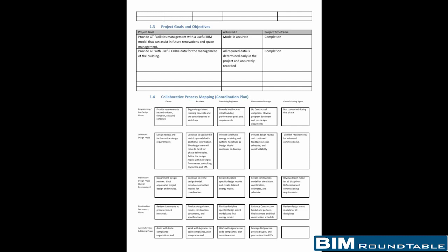We talked earlier about bringing the subs in and getting them involved. Well, a lot of times the subs aren't going to be on board yet. We're not going to know who they are until way later. So when they are on board, then we bring them up to speed and make adjustments to the plan. At that point, it could be resubmitted. And with sub input throughout the project, there might be some changes, I don't know what those milestones would be. That's why we have that whole exercise with the cards, all the inputs and outputs.